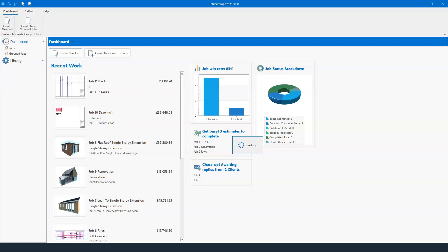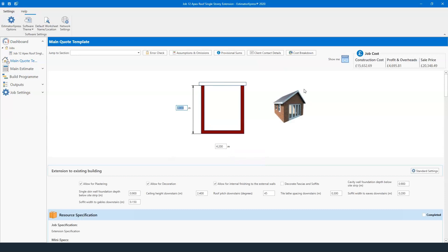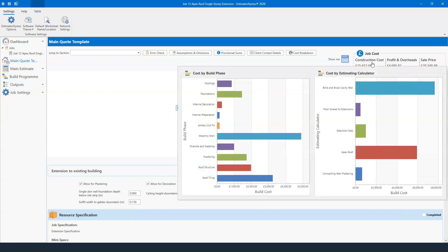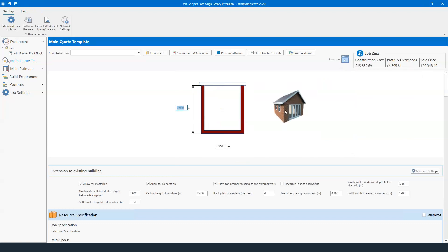You'll be able to see a nice image of the apex extension. We've got 3.9 meters for the length and 4.2 for the width. Up in the top right-hand corner you have the construction cost, the profit and overhead, and the sales price — that's excluding VAT. Hovering your mouse gives you a breakdown: footings, foundations, internal decoration, internal preparation, brick and block cavity, warm floor screed, apex roof, and so on. If I want to see that in more detail, I can click 'Cost Breakdown' at the top of the screen.